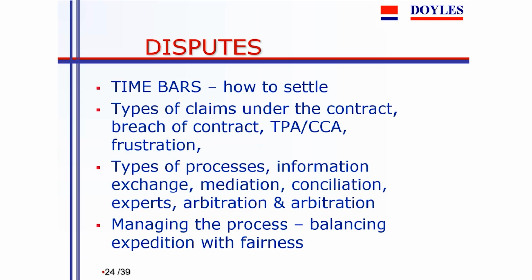The other aspect is there's always an aspect of frustration. If some aspects of the situation change and the contract can't be performed in the way that it was originally intended, then it may well be a situation where the contractor can seek to have an adjustment under the provisions that relate to frustration. So you've then got to look at what ways you can resolve things.